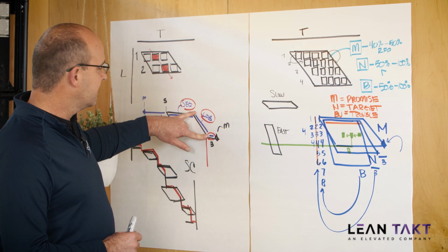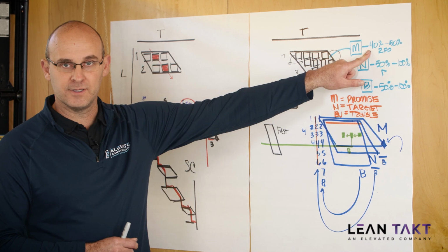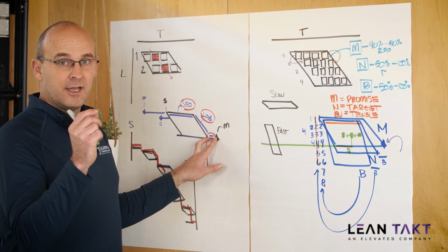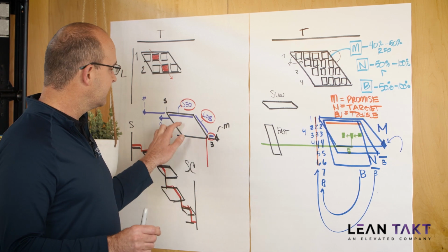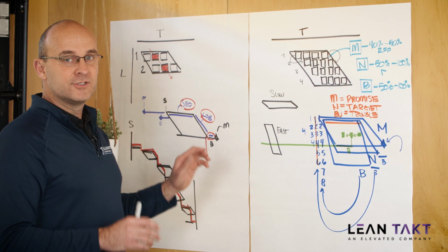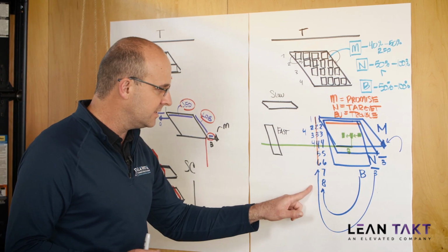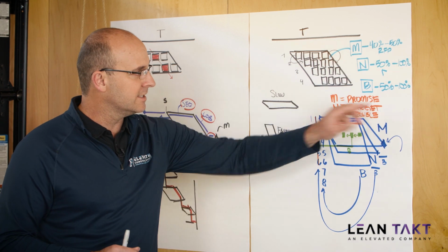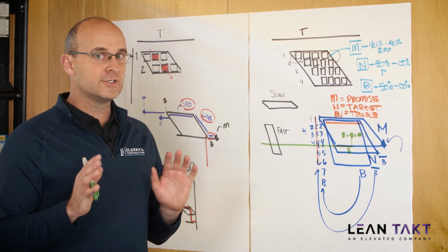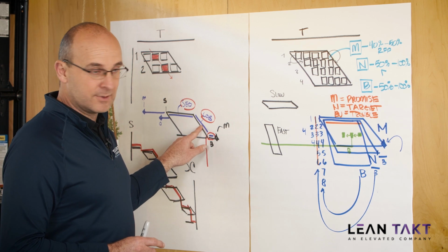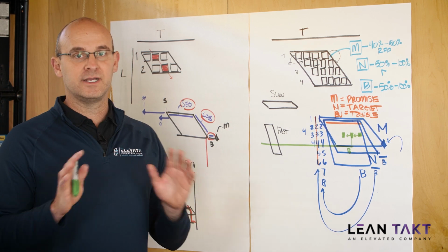Your line of balance can be verified with this formula. Your buffer can be verified by analyzing how many risks this phase has. So if your owner is ever like, whoa, where did you get these numbers? Where did you get these zoning strategies? Where did you get these percentages? You can always go back and validate the sequence with the pull plan, the line of balance with the calculator, and your buffers based on risks.